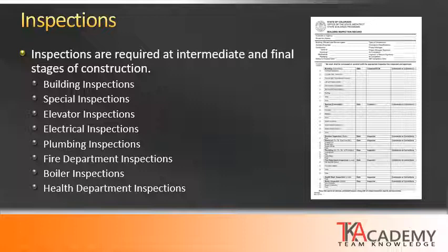It is up to the general contractor to coordinate with the authority having jurisdiction to perform these inspections. However, the architect many times is copied on the results of these inspections as a way of documenting the process and reporting to the owner the status of the project.